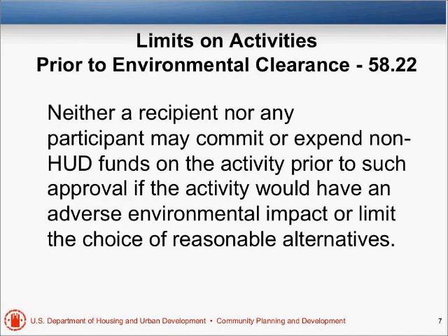The one thing that you don't want to do is, there's a regulation, 24 CFR 58.22, that says neither recipient nor any participant, in other words, not just the local government, but maybe there's a subcontractor or the developer, may not only expend the non-HUD funds, but even commit them on the activity prior to the approval of that activity.